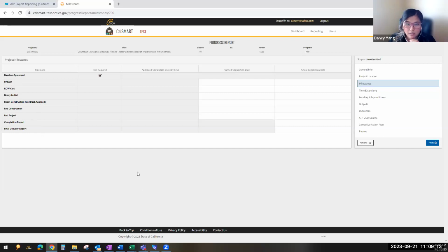Okay, completion report. Again, remember, as soon as you're done, the project is now, for infrastructure folks, operable. Submit it as soon as it's operable. Send us a completion report. The after counts are not due in the completion reports. Once you send us that completion report, it lets us know that you've completed your project, so we can start maintaining and ensuring that we're tracking you in submitting your final delivery reports and stuff like that. Submit your completion report as soon as it's operable for infrastructure and non-infrastructure. As soon as you're done with the last program, submit your completion report.